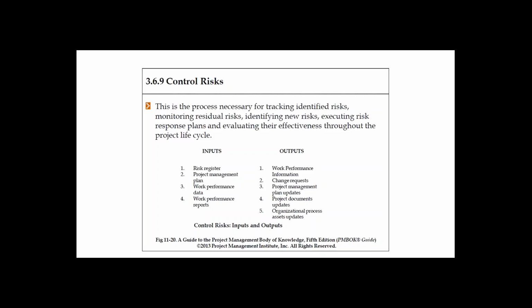First is identify risk, second is evaluate the risk with quality metrics or quantity metrics, and propose mitigation plans, or whether you need to accept or transfer or reduce the risk, things like that. And finally the risk is updated. So this is a typical flow for risk management.